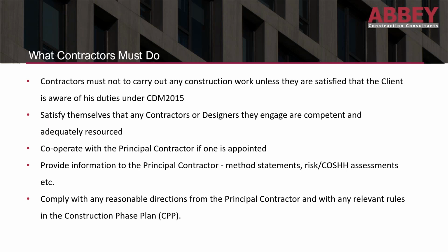Contractors must not carry out any construction work unless they are satisfied that the client is aware of their duties. That's their first requirement under CDM. They must satisfy themselves that any contractors or designers they are engaging are competent and adequately resourced. They must cooperate with the principal contractor if one is appointed. They must provide information to the principal contractor such as method statements, risk assessments, cost assessments, and safe working methods. They must comply with any reasonable direction from the principal contractor and with any relevant rules stated in their construction phase plan.